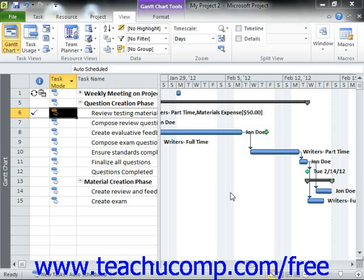As used within Microsoft Project, a critical path is the set of tasks that, if delayed, would extend the end date of the project file. The term critical, as used in this context, has nothing to do with the importance of the task to the overall completion of the project. Rather, it is called a critical task if its delay would extend the ending date of the project. Therefore, the critical path of a project is the path of tasks within a project file that cannot be delayed without delaying the entire project deadline.